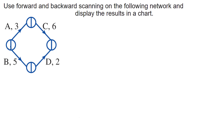The forward scanning starts from the left-hand side of the network and works all the way through to the end node. The left-hand node represents the start node and the right-hand node represents the end node. The forward scanning values go on the left-hand side of the nodes, and we always start at time zero — I'm starting this project right now. Then I start looking along all the paths available.